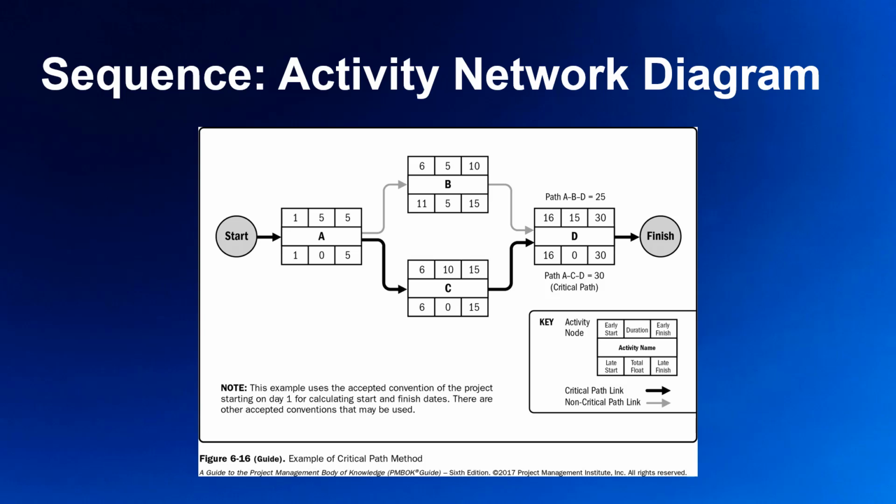You may be thinking, why are we talking about the project schedule network diagram when this is a quality lesson? The answer is because you can use this diagram to identify the potential for quality issues in your process. Some tasks may overlap and be performed at the same time. If one person is assigned to multiple activities, it may result in resource overutilization, which may in turn contribute to burnout, errors in rushing that lead to rework, or overtime cost.